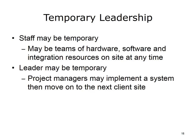A few words about temporary leadership. Large and even small-scale IT implementations may have several teams from several companies who usually come in to perform temporary tasks. For instance, an inpatient hospital may have contracted the services of a hardware company for the servers, a software integration team to link the interfaces to various systems, project managers to manage the schedule, budget, risks, and development work, and account managers from the vendor company to ensure contracts are carried out according to plan. All of these teams are scalable depending on how large the implementation is, but it's not unusual at a large hospital to have between 20 to 60 external resources on a project team at once. Even in small office practices, there are often multiple teams operating at the same time.